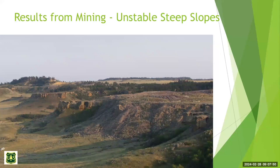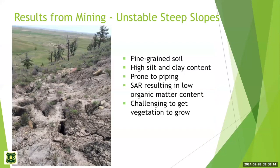The mining overburden was pushed over the bluff edge, and what we're trying to do is clean this up and put it back on top of the bluff to expose the beautiful sandstone cliffs visible in the surrounding area. These slopes are super steep — some are one-to-one — so not walkable. The soil is really prone to piping, making it unstable and dangerous for equipment. The high sodium adsorption ratio also makes it really hard to get plants to grow.